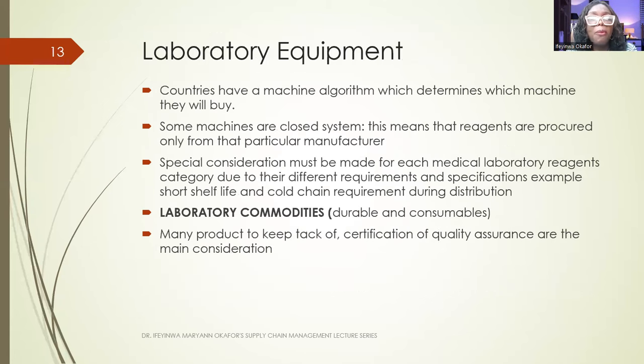Or where you have in a facility an unusual and compelling urgency for a particular product, or it is authorized or required by states, and then public interest. Example, sole source occurs when using a medical laboratory machine that is a closed system and requires the use of one reagent produced by one manufacturer, like we said earlier.